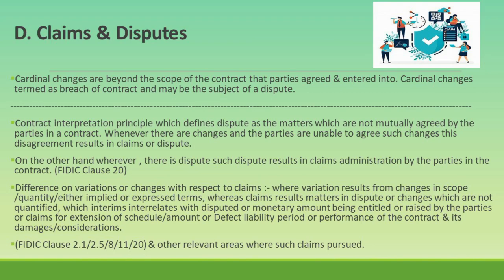FIDIC Clause 20 provides a structured process for handling claims, disputes, and arbitration. It requires the contractor to notify the engineer of claims and keep detailed records. The engineer assesses claims and makes determinations. If disputes arise, the clause outlines steps for amicable settlement, adjudication, and arbitration. Differences on variations or changes with respect to claims occur when variation results from changes in scope, quantity, or either implied or expressed terms. Claims arise from matters in dispute or changes that are not quantified, and these claims interrelate with disputes over monetary amounts, extensions of schedule, defect liability periods, or performance of the contract and its associated damages or considerations.